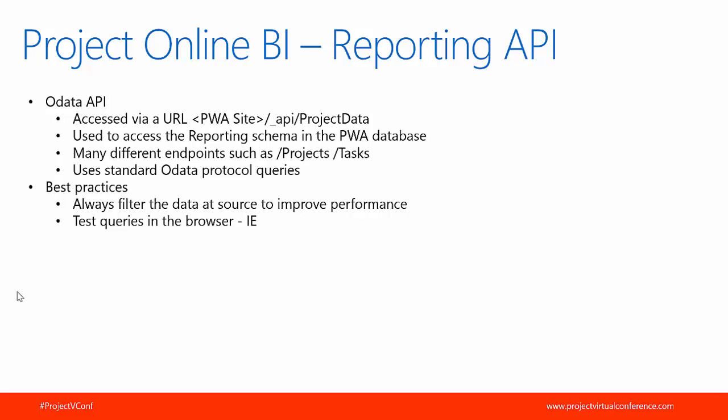Certainly on the time-phased data sets where large amounts of data are contained, it's very, very important to make sure that you do filter that data set at the source to improve the end user experience. Whenever I'm creating new reports, whether it's in Excel or SSRS or Power BI or even JavaScript, I'll normally create the URLs that I need to get that data.